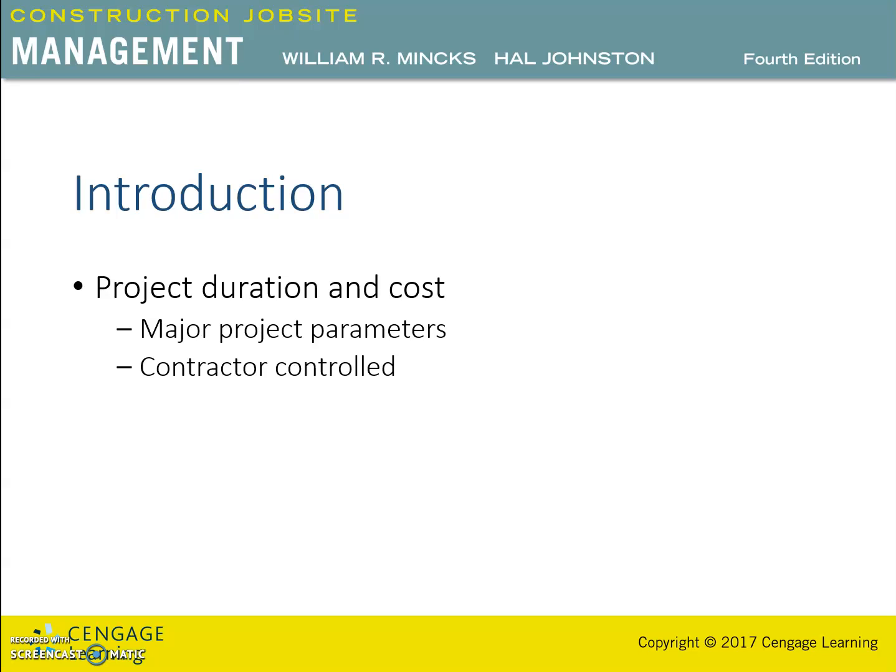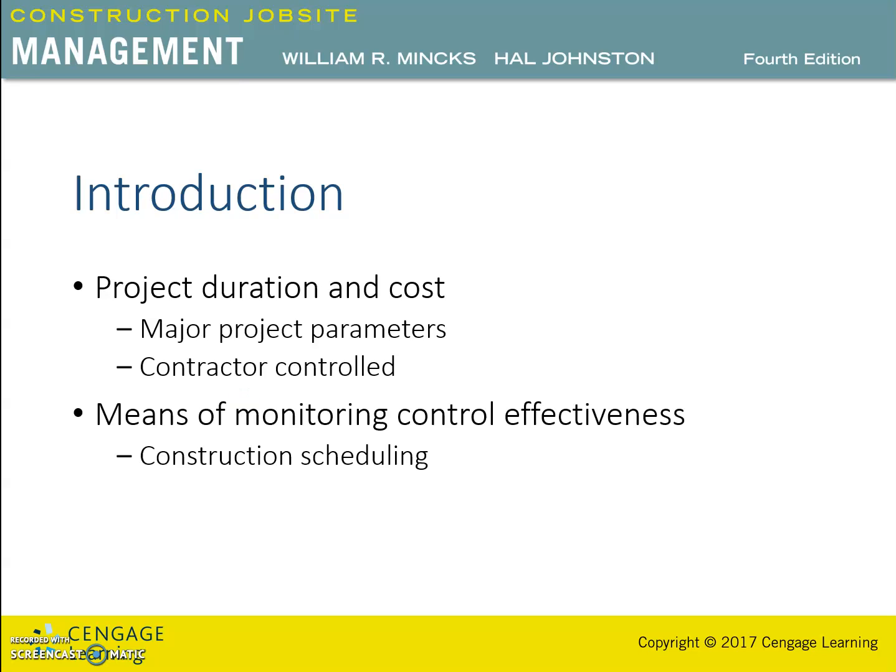Traditionally, the contractors' field personnel did their best to complete the project as quickly as possible with the minimal cost. The results of this effort during the project were unclear. It would appear as though the project would be completed on time and the project cost seemed to be within the budget. In recent years, however, the use of construction scheduling and computerized cost control accounting provides a means for monitoring the effectiveness of the controls during a project, allowing field personnel to adjust productivity factors, crew size, and subcontractor activity to bring the project to acceptable progress.